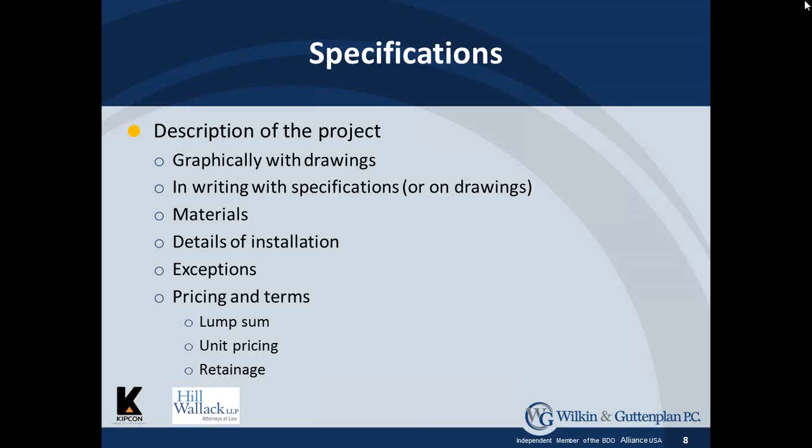The other thing I have to mention is payment terms. Some contractors like to get paid a certain amount of money up front, and we generally push back against this and only pay contractors for work that's been completed, so they're not getting ahead of you in terms of the payment. And again, this is something that will be talked about in greater detail as part of the presentation.